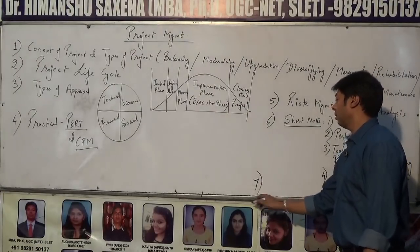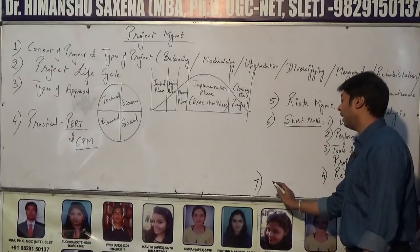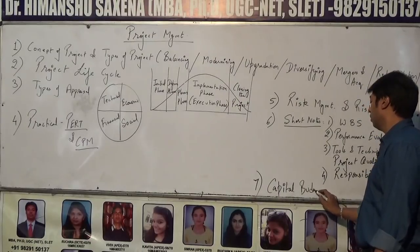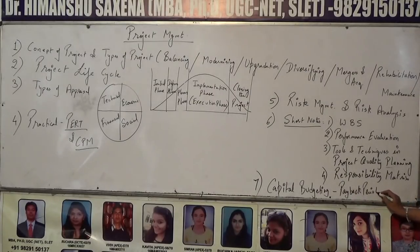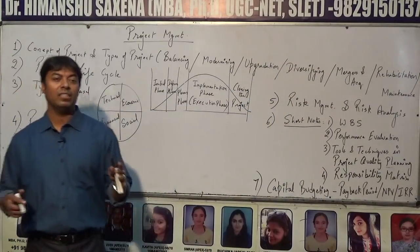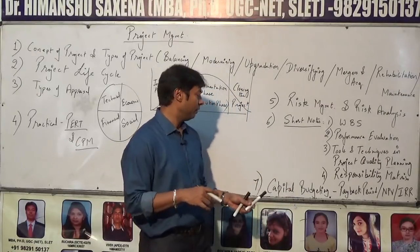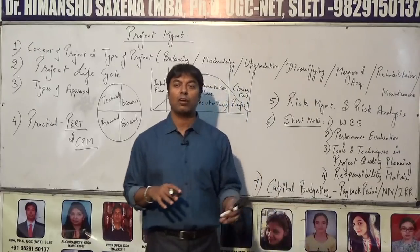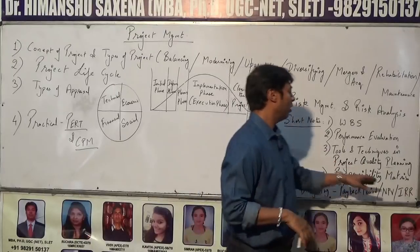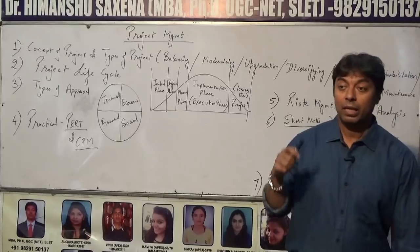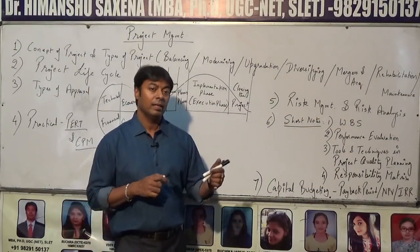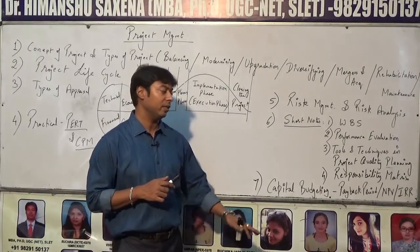Another important short note is the responsibility matrix. And finally, a very important practical on financial appraisal or capital budgeting, whereby you select or reject the project on the basis of payback period — the project with the lowest payback period is selected — or net present value, where the project with the highest NPV is selected, or a positive NPV for a single project. Projects with negative NPV are rejected. You also consider internal rate of return, selecting the project with the highest IRR.